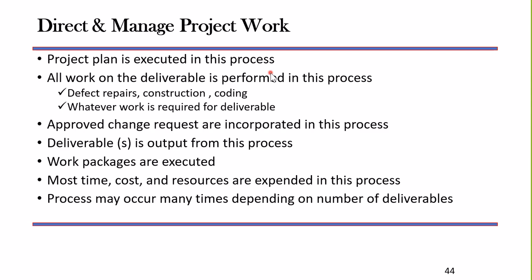If we have an approved change request, this is where we would incorporate those changes. This is where we will handle all defect repairs. Any work done on the project is going to be done under direct and manage project work. This is where we spend the money. This is where we execute the work packages. Direct and manage project work.